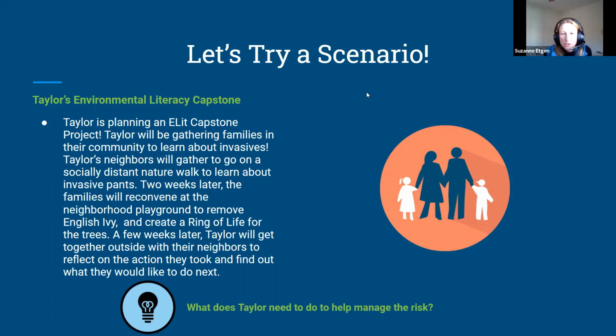So Linda asked a really important question in the chat, and this is actually something that we just reviewed and tried to get a little policy distinction on. Do you need a signed form from the HOA? If you're just doing a gathering at a place, you don't need the HOA to sign that they're releasing you from liability, because you're not really doing anything to the site. However, if you were doing, oh, you know what, that's right, this is the invasive removal. For the invasive removal, because that's a project, you would want the HOA to sign the property owner agreement.